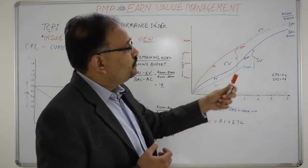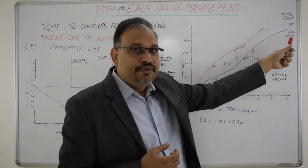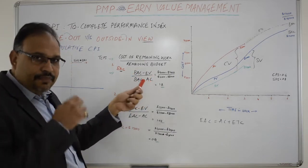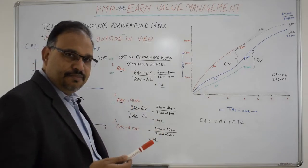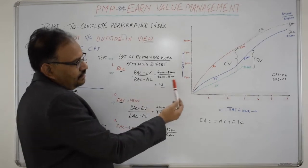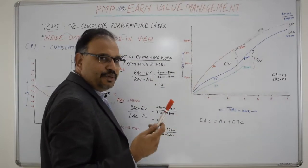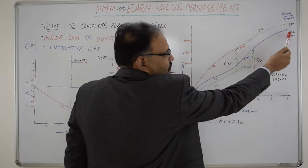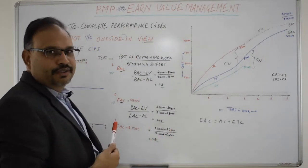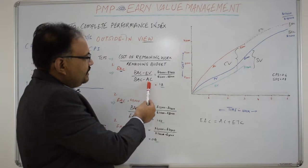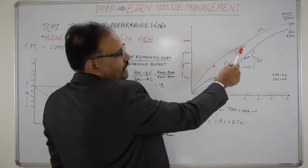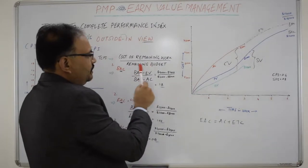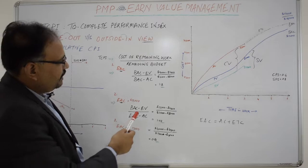When the project wants to achieve the original BAC, the TCPI formula is: (BAC minus EV) divided by (BAC minus AC). In our example, BAC minus EV represents the cost of remaining work — the project completed 8 kilometers worth $4,800 against an approved budget of $12,000, so the difference is the remaining work cost. BAC minus AC is the remaining budget — actual spend is $8,000 against a target of $12,000. In this scenario, TCPI comes out to 1.8.